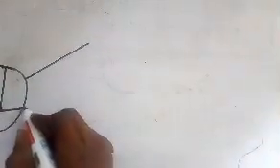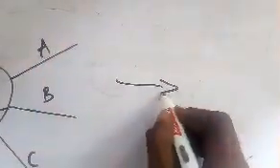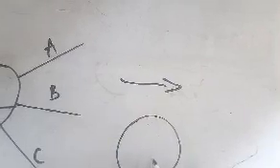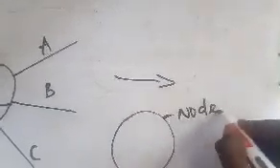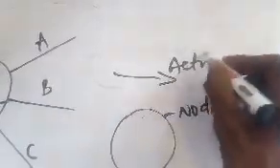So you have your activity 1 and it says A, B and C as none as their predecessors from the question. That means you can draw your A, B, C here. An arrow is an activity. A circle is a node, N-O-D-E.